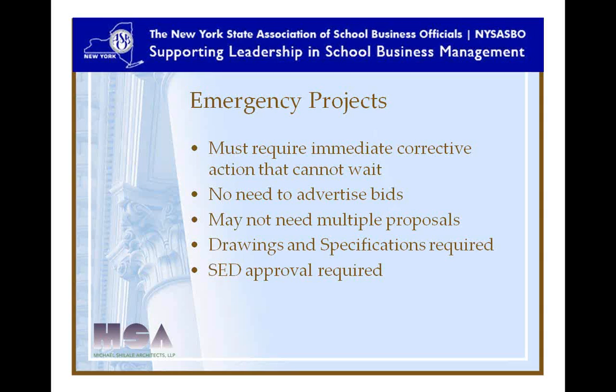We had done another emergency project when we lost an electrical service one summer. Fortunately, we lost that electrical service over the summer. It took about 3 weeks to get it back online, and SED was very helpful in working with us. We just went to one of the electrical contractors who was on another project in that same district, got some pricing from them, and were able to get that service reinstalled. That's one of the things that we have a creative financing solution for, so we'll go over that in a little more detail toward the end of the webinar.